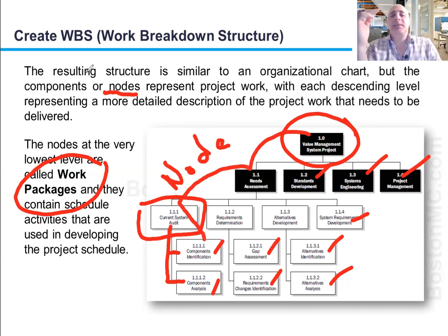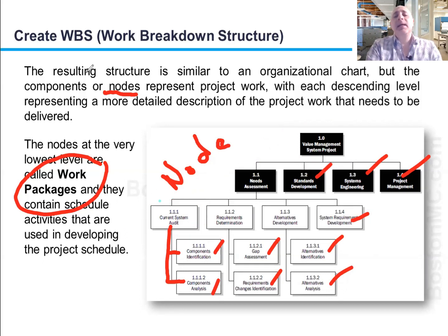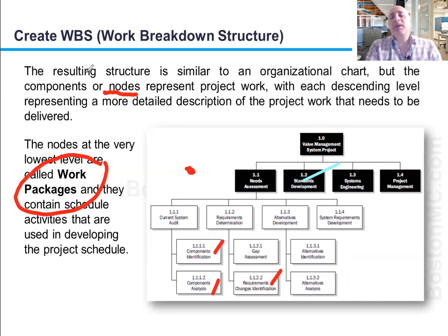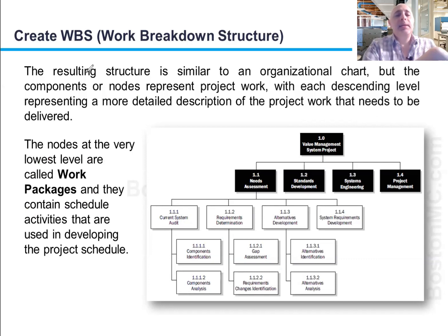So that's how they sequence down. Completing the lower level completes the upper level. And one more thing about the WBS is that what you see here is the intended scope of work. So whatever you don't see, you should not be expecting it to happen, all right? That's the expectation, that this represents all of the scope of work that I intend to get done on the project, all right?